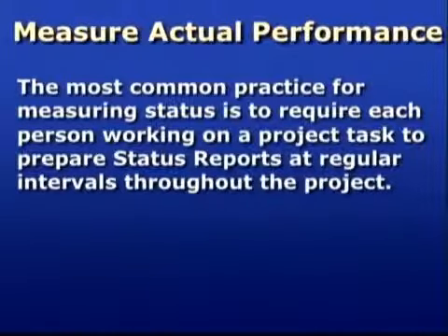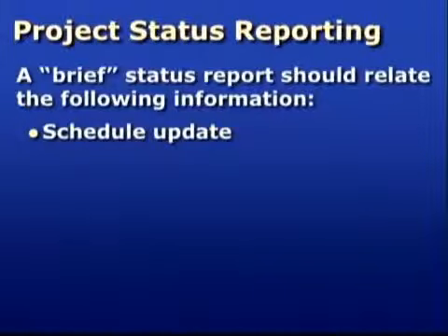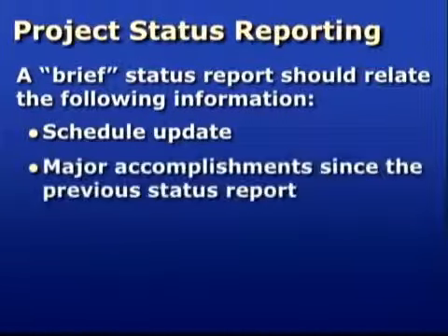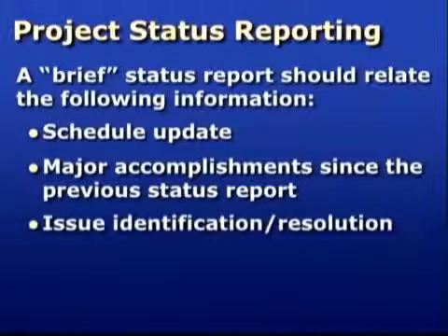The most common practice for measuring progress is to require each person working on a project to prepare a brief status report at regular intervals throughout the project. There are only 3 things a project manager needs to know to determine the status of a task. Are you meeting the schedule? What have you accomplished? And what issues need attention?